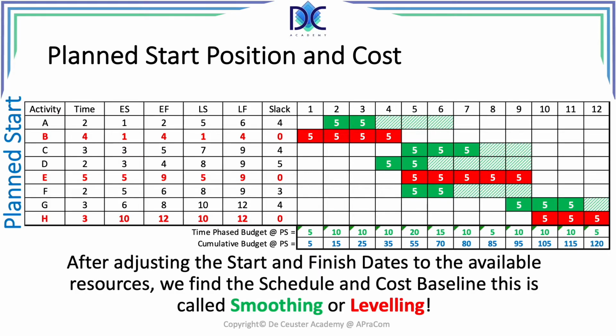Here I refer to the planned start position. You will notice again that the intermediate values are different, but also that the budget at completion did not change. This is of course logical because the project remains unchanged.